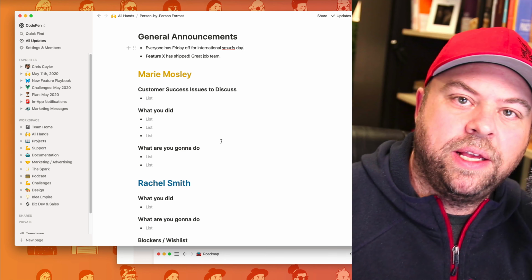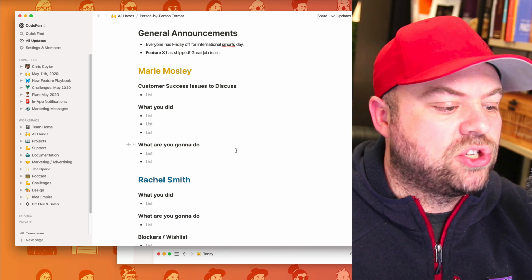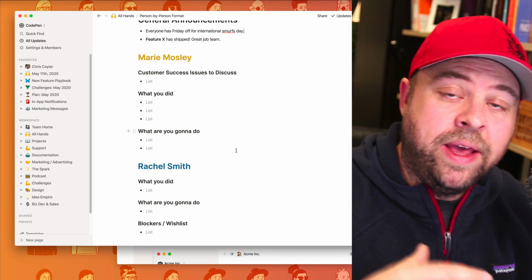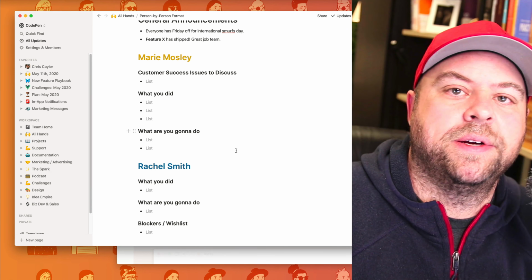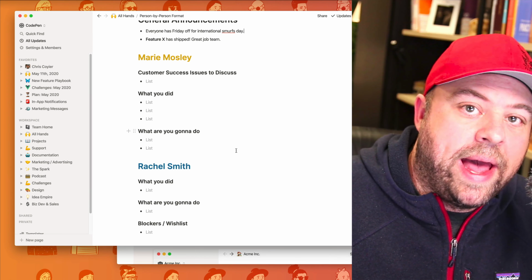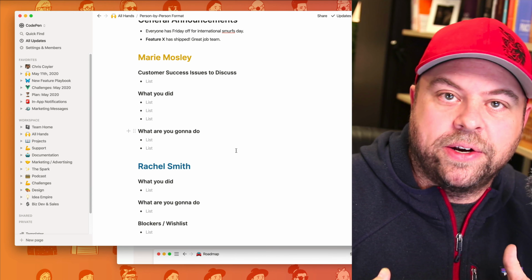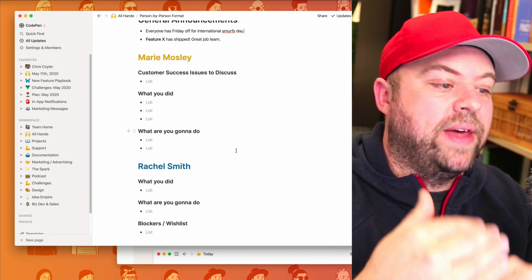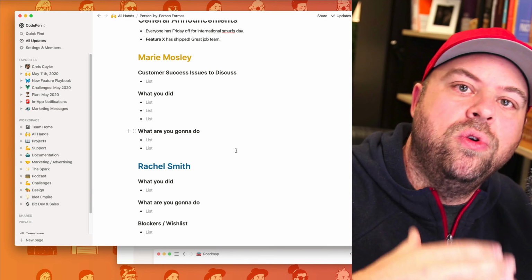And if there's particular things that that person uniquely needs to talk about, they can do it then. But then there's a structure beyond that, which is: tell us what you did, and hopefully that matches with what you said you were going to do last week, so there's some comparison possible there. And if that stuff didn't happen, you can talk about why, which is interesting because if it didn't happen, it probably has to do with blockers, something unexpected that happened that week. And then talk about what you're going to do.